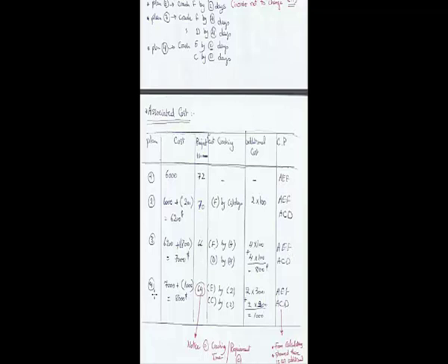And in plan number 4 is that we start by the cost from the last point on the last plan, which is 7,000. And we have crashed E by 2 days and C by 2 days also, and each additional cost per day for E equals 300, and for C equals 200, and the summation of them equals 1,000. So 7,000 plus 1,000 equals 8,000.